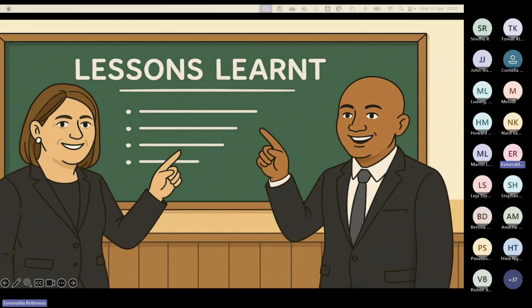Yes, so I can maybe just add to that. Apologies if I'm repeating anything that Rishen has said, but it's always difficult, for me at least, after the fact, to summarize any lessons learned. But a few to take note of. We've mentioned MVP before, and we're inclined to use this term loosely, but it needs to be defined. Don't assume that you and the client will always be on the same page in terms of what needs to be included in an MVP. A quote I heard the other day, which was quite apt for this situation, is that one person's nice to have is another person's must have.